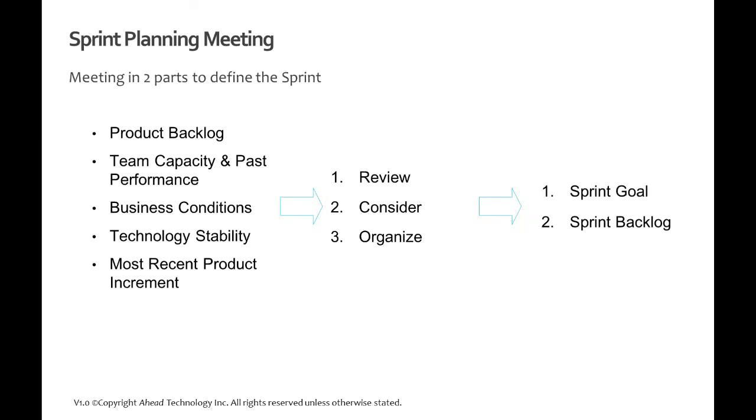Okay. This is typically time boxed. We've got another slide that will show all the time boxes, but this is time boxed as 8 hours. This is 8 hours spent together as a team, and highly, highly recommended that it's face-to-face. Okay. I'll talk about the challenges with remote sprinting at the end of this as well.